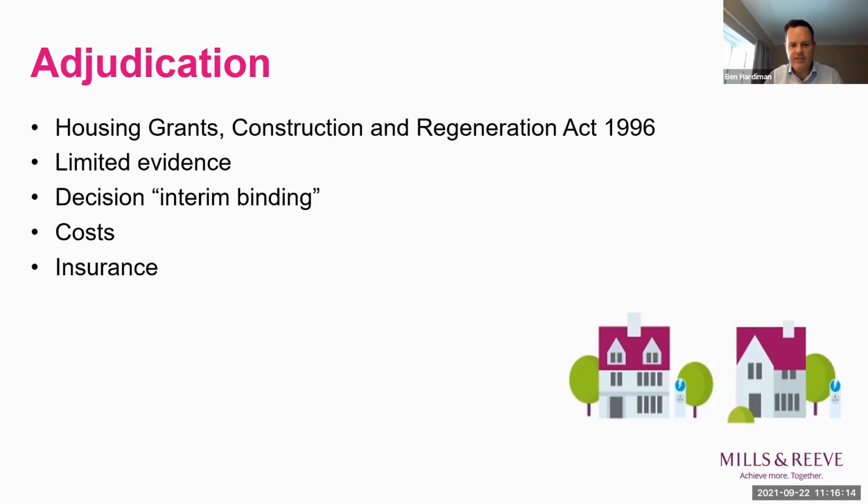So whilst there are undoubtedly risks for anyone entering into this process, it's often been referred to as shotgun justice because it's such a high level process, because an adjudicator can't really consider the detail quite as much as a court would. But the converse is that it is relatively quick and cheap when you compare it to legal proceedings, which may take a couple of years to get from start to finish, and undoubtedly very significant costs.